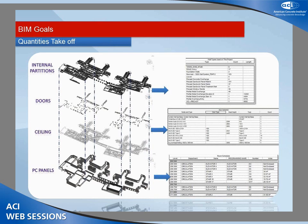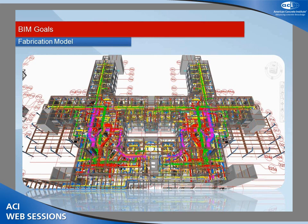For quantity takeoff, some of the things we targeted were interior partitions — very quick to grab all the square footages of chips, framing, and paint required for the job. We worked with consultants to make sure models were developed for that purpose so we could use them for quantity takeoff. Obviously doors, ceilings, and the precast concrete panels on the exterior of the building were also targeted.